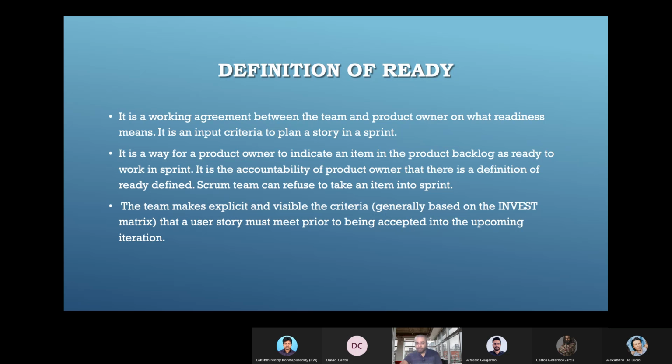And practically, you will have cases where something is very urgent with less information, it's added, and then there is pressure and it got pulled in. If such a thing happens, we will have it in the next sprint retro. In the sprint retro, highlight what didn't go well, and in the action items, it should not happen in the next sprint. This is how the team is going to gain learning and more maturity from a process perspective.